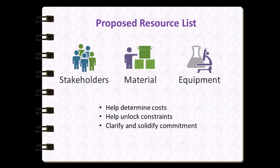The proposed resource list is a very important section. It solidifies the organization's commitment to the project and helps set and clarify the client or stakeholder's expectations for the project. Project resources can come in many forms, including the project staff itself, physical resources such as computers, vehicles, and office space, access to shared resources such as time in a lab or meeting rooms, and access to people such as subject matter experts or high-level executives. By defining and agreeing on the allocated resources that the project will have access to, the project manager, the organization, and the sponsor or client define another piece of the overall project framework.